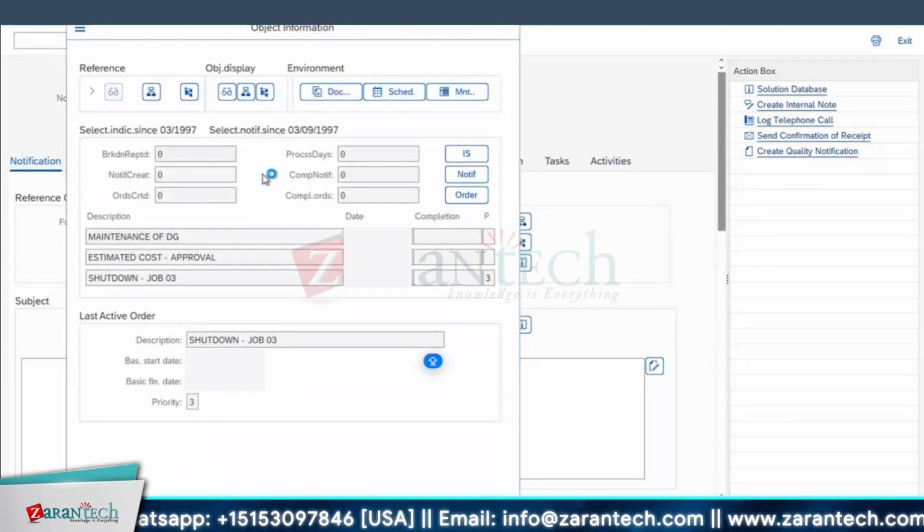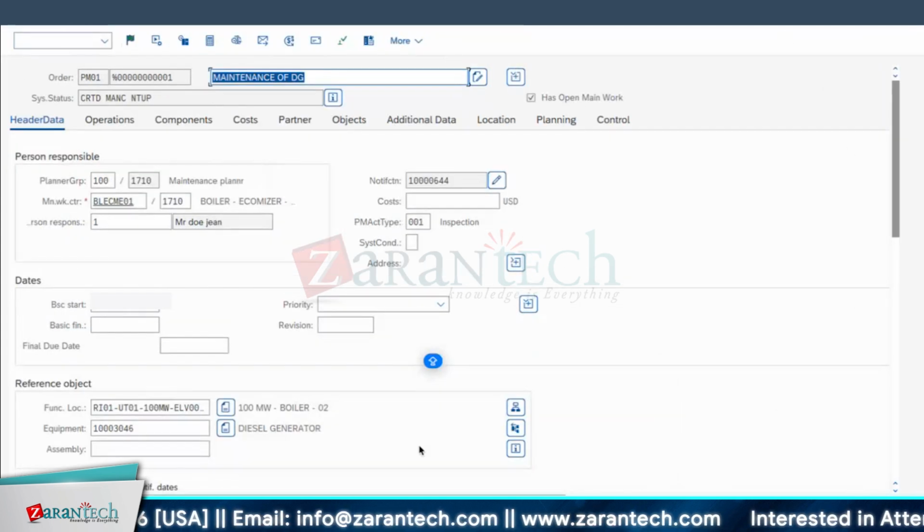Okay, so continue. So this work order screen, now you are familiar, right? For permits and classification, we have seen this just now. This is your screen. Like this you want to create. This is SAP best practice: you create a notification first, meaning someone has notified the technician to carry out the job, and he has put the notification in process and released the task. Then you create an order, then you go forward. It is a process, and you can define who has to do it: maintenance technician, supervisor level, technician at site level, like that.